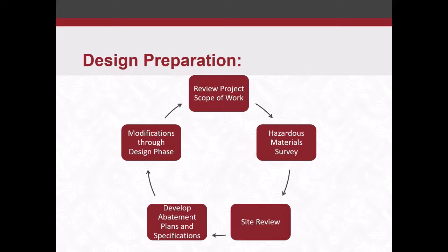Once you do a hazardous material survey, when you get into the design portion of it, you're doing the hazardous material design. Obviously you're developing your abatement plans and specifications, but it's also good to have the designers do their own site review, especially if those designers aren't the representatives that did the initial survey. So you want to get a second set of eyes on that.